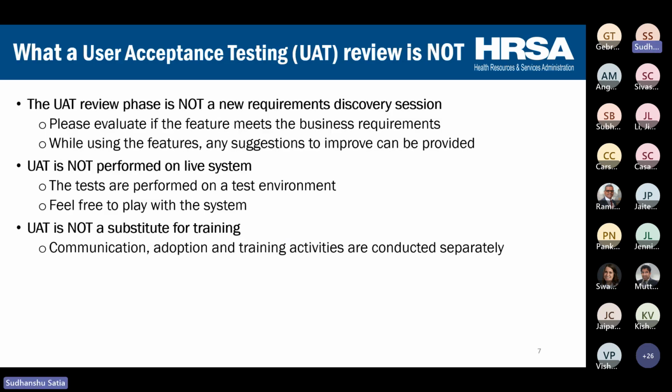Now, what this user acceptance testing is not about. This is not a new requirement session. However, any feedback or comments on usability are accepted. If you see any major gap in the implementation, please bring it to our attention so that we can discuss it with the program and HRSA technology office and prioritize it accordingly. However, the implementation is based on the requirement discussion which happened in the past with the program